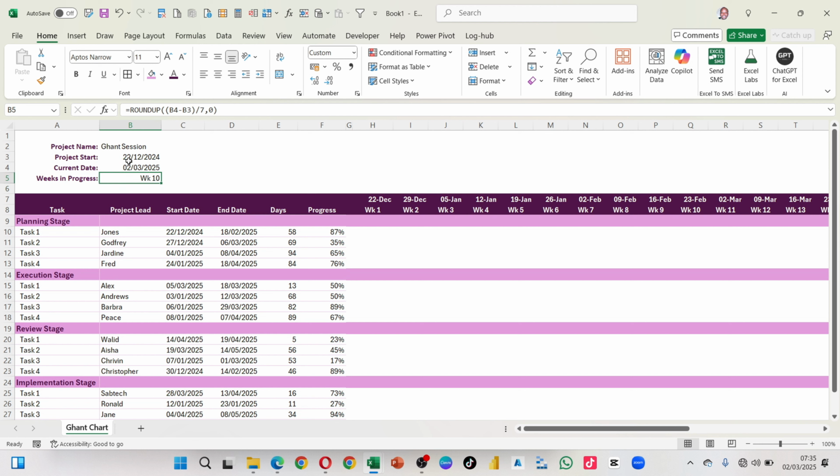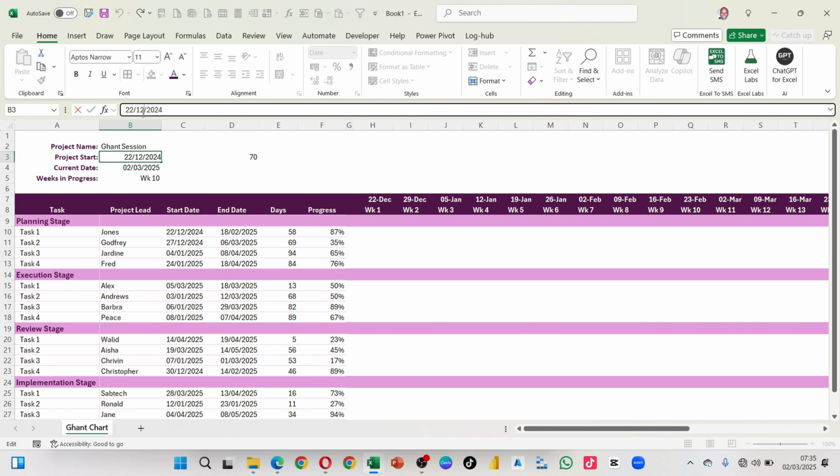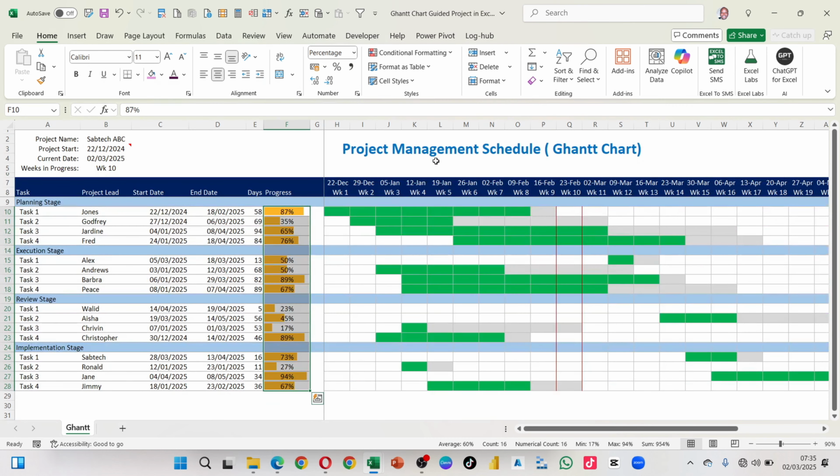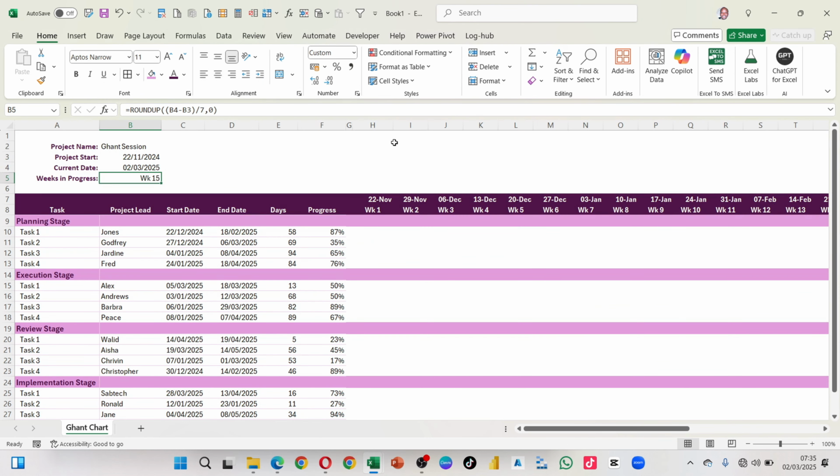It means that even if this changed and you meant to divide and get a decimal, remember when we subtracted today minus when the project started, we are getting 70. But imagine this was, let's say, November. At the end of the day, you may have decimals, which you'll always have to use ROUNDUP to sort out. So we are picking shape. We'll have my header here.